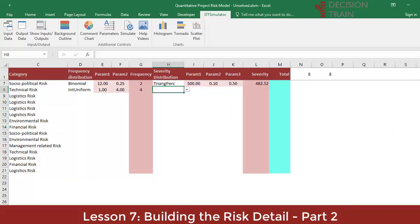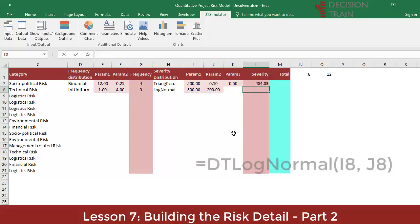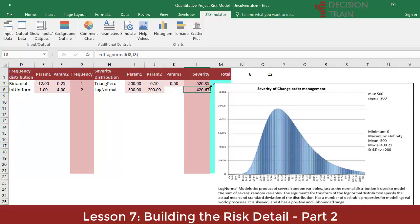To model the severity of this risk, we will use a log-normal distribution. As in the case of the gamma, a statistical work with available historical information would be required. We use it here for demonstration purposes. Insert your first mu parameter of 500 into I9, and your second parameter sigma of 200 into J9. The log-normal distribution models the product of several random variables, in the same way that the normal distribution models the sum. It is skewed, has a positive and unlimited range, and can be used to model a non-negative value when positive bias is required.